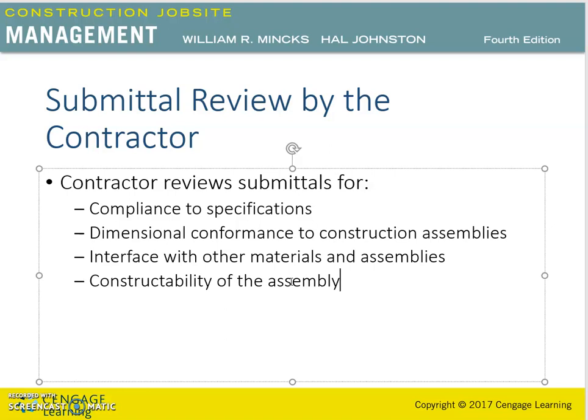When installing the material and equipment with their own forces, the contractor will use the submittals to determine the necessary equipment and workforce to construct the assembly. Although the contractor should have determined a plan for installation during the estimating phase, a detailed examination of the procedures is necessary during the construction phase.